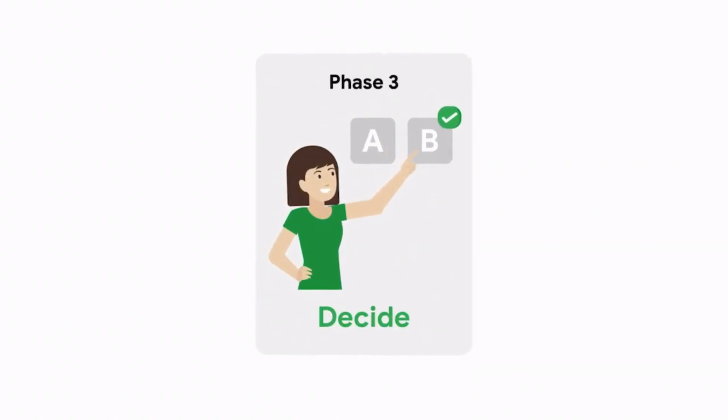Don't worry about your drawing skills here. The idea is what matters. On top of all the ideating that happens in phase 2, you also need to start planning for user testing, which happens in phase 5 of the sprint. During user testing, you'll have a diverse group of people test your product and provide feedback. To be able to do this, you need to start recruiting users that fit your target profile now, so the sprint stays on schedule.